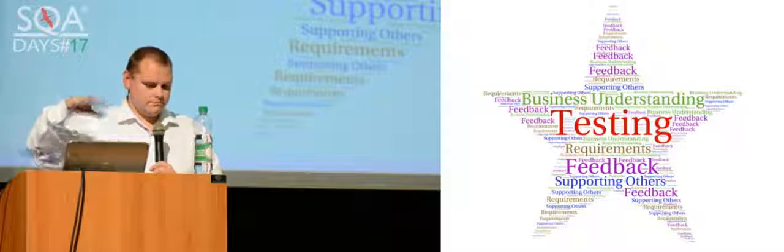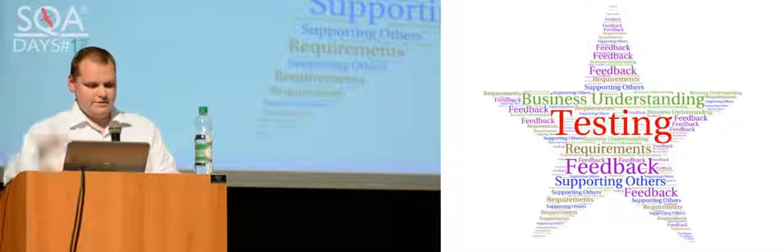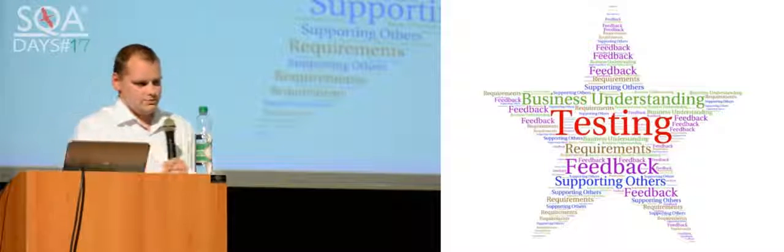Basically, when you have a poker and everybody raises their hand with their number, then maybe change it so that at first the developers will raise their hand, and then they will start to think about it more, because then they will be the first, and everybody else will challenge them.